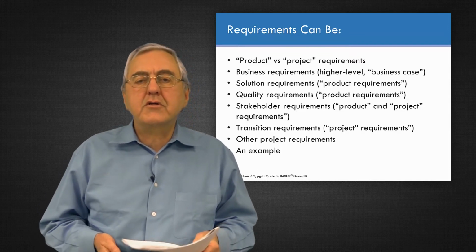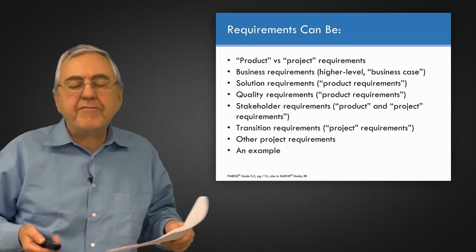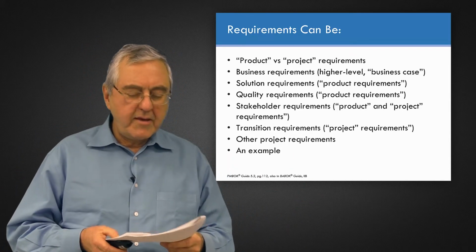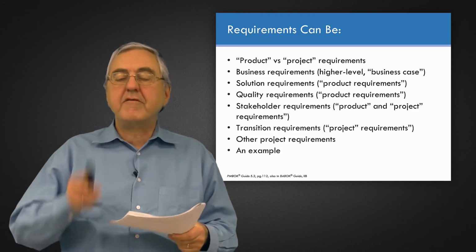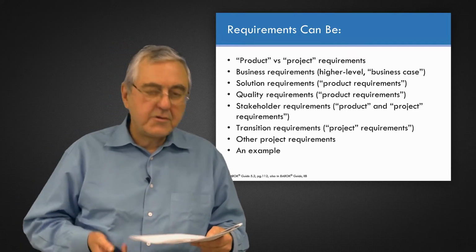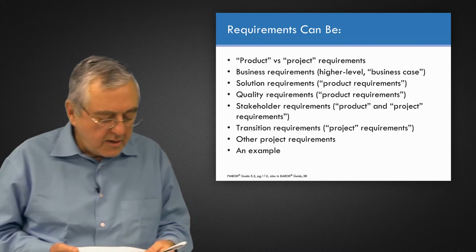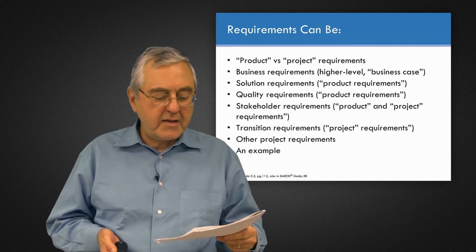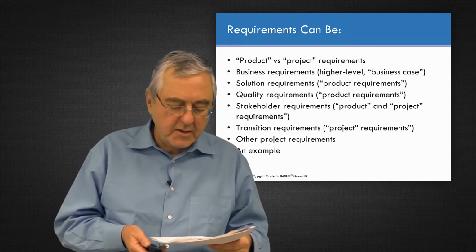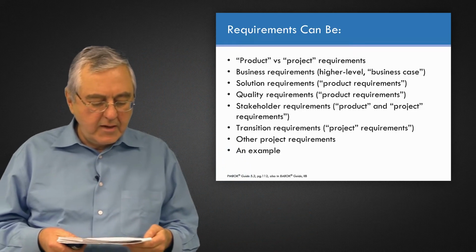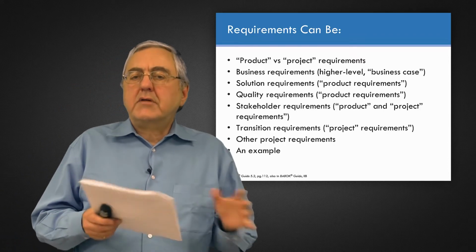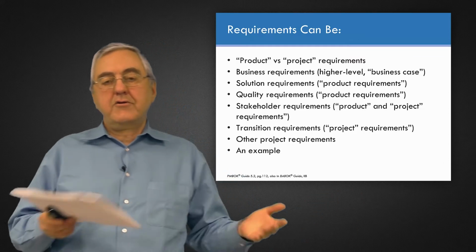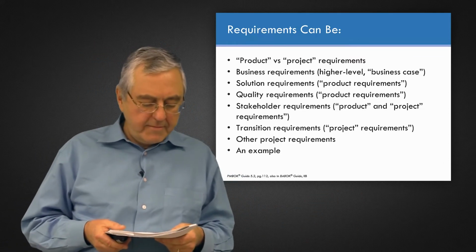Now there's also solution requirements. And these fit within what you could call product requirements. They have to do with the features or characteristics of the final product or result. So in this hypothetical case, en-suite bathrooms for every suite, live-in accommodation for the couple, a maximum of 10 minutes walking distance to shops and restaurants, burglar resistance, and other things. It's related to the final product of what is created in terms of a bed and breakfast or inn.